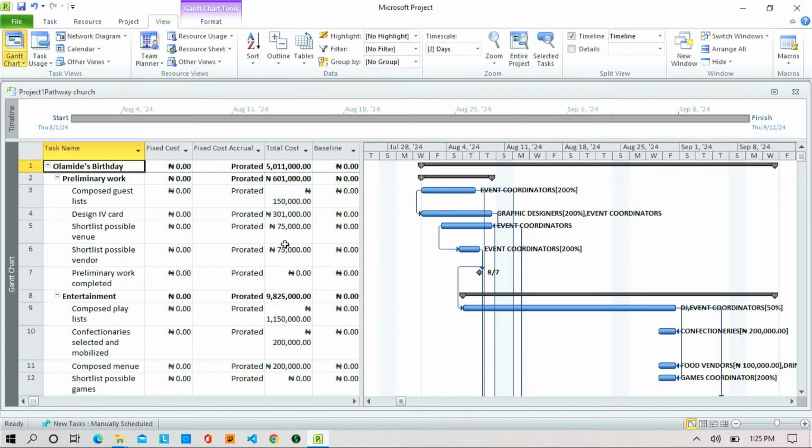So to effect that change is called preventive action. You have not done anything. It is the most cost-effective change request you can think of. It's not costing you anything. It's like you have done the design for your house, and then I want to build a duplex.